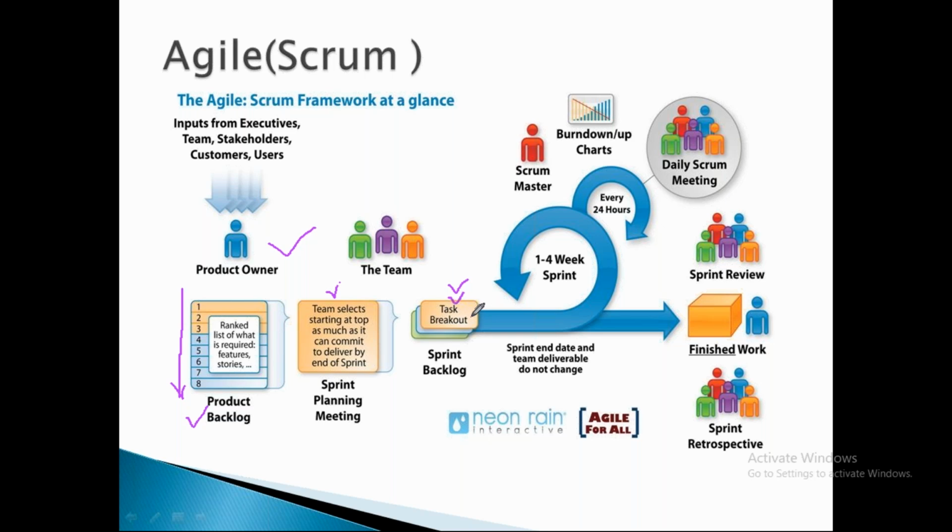And as per the plan, how is the sprint planning done? 3 weeks or 4 weeks. Suppose I say 3 weeks. So a sprint can be 1 to 4 weeks. Let's say we are planning one sprint of 3 weeks. What will you be doing first? You need to understand those user stories. So grooming sessions will be there, and estimation of story points. The estimation part will be there.